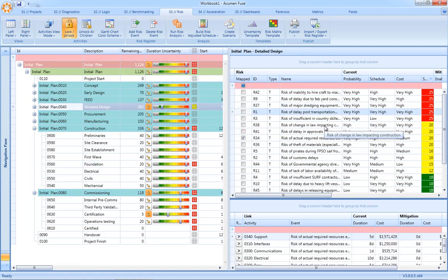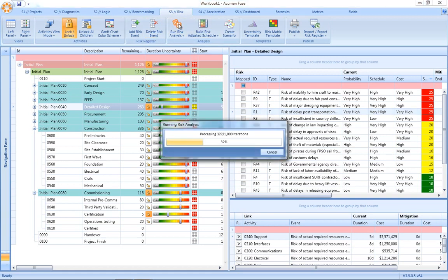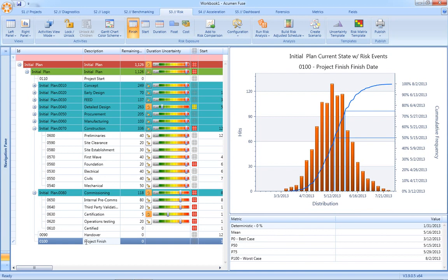Once we've applied our certainty factors and risk events, we can then run our risk analysis. From a reporting perspective, Acumen Risk contains three key risk reports. The first being the risk histogram.